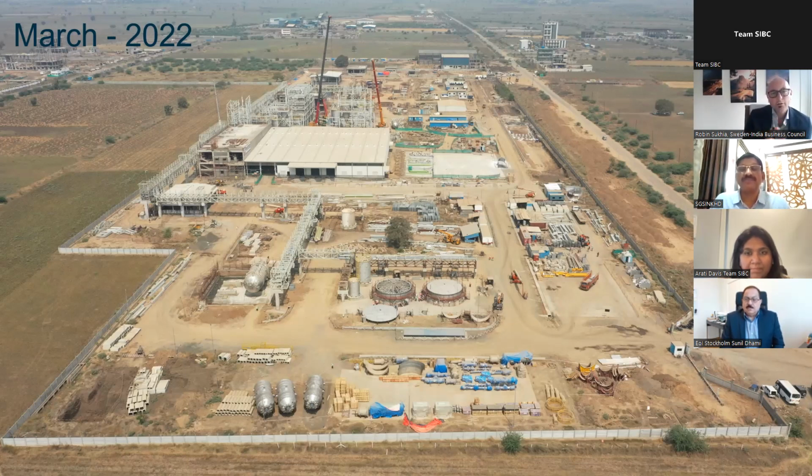And could you expand a little bit on the training? How did that work, and what did you do more in safety than others may not do? In this contract, when we were discussing, we included the safety manual as one part of the contract agreement. In the safety manual, for example, here on the right side, you can see, many people used to be transported in an open truck as construction workers. That is a lesson learned also. So we told them that we cannot accept that. Either you need to build a labor colony nearby the site, otherwise you need to provide a good bus service.